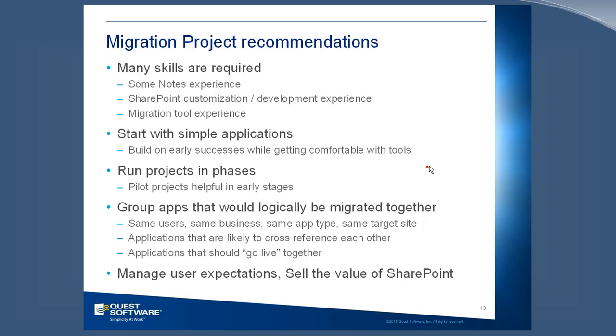So typically people run projects in phases. They'll pick a group of applications that go well together, and then migrate those, and then do a debriefing on that, look at what happened with that set, then do the next one. And so often a pilot phase is very helpful. Most customers will now do a pilot before they get into serious migration work. And so the pilot phase helps them with their estimates of bandwidth in their environment and things like that.